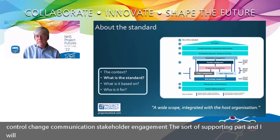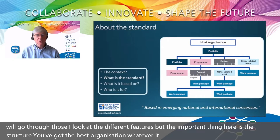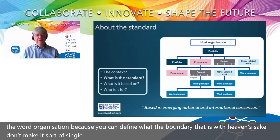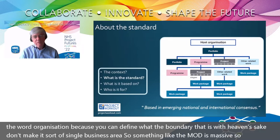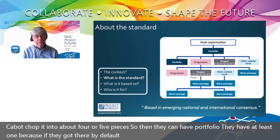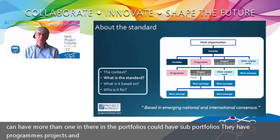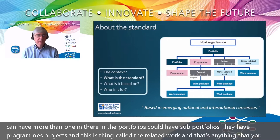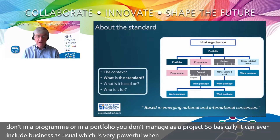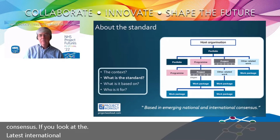The standard's structure has a host organisation at the centre — deliberately called 'organisation' so you can define the boundary. Something like the MOD is massive, so they split it into about four or five pieces. By default, the organisation is the portfolio, and can have more than one. Portfolios can have sub-portfolios, programmes, projects, and 'other related work' — anything not managed as a project within a programme or portfolio, which can even include business as usual. This structure is based on an emerging national and international consensus visible in the latest international standards.